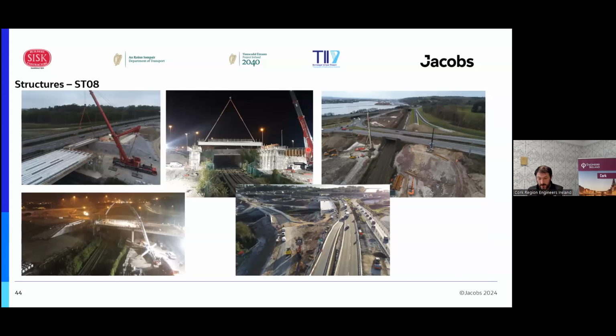We talk a little bit later about this, but just from a geotech point of view, you have a CFA rig in here working 1.4 meters off the railway line, installing 32 meter, 1200 diameter piles. Then you have a leader rig working here. So we had to build a platform, and then we had to install the piles here because basically the bridge had to be constructed in two phases. So if you look at the photo on the left-hand side where the crane is set up, that's half of the bridge getting constructed while maintaining the M8 live here.